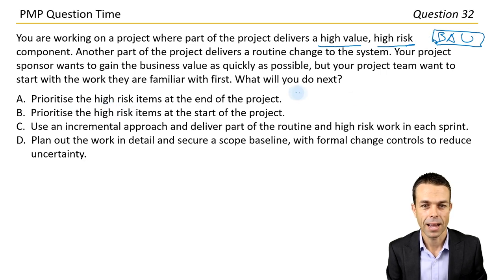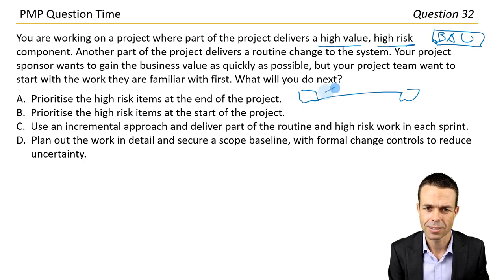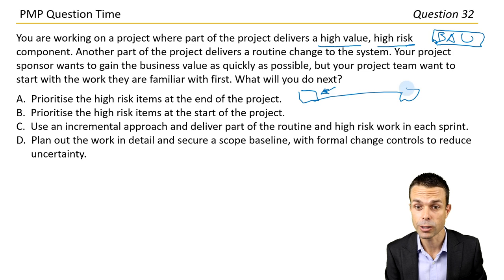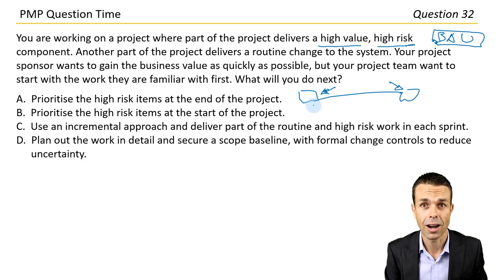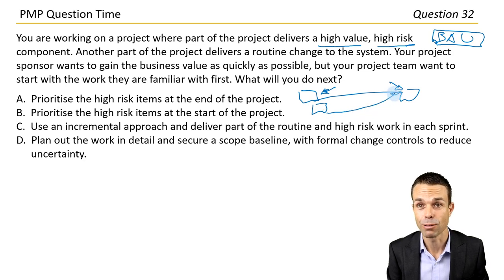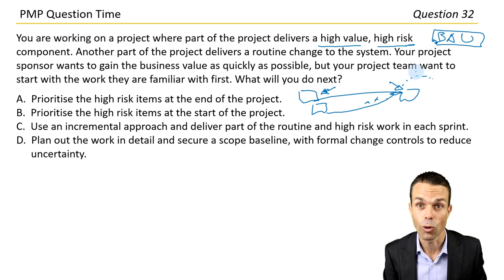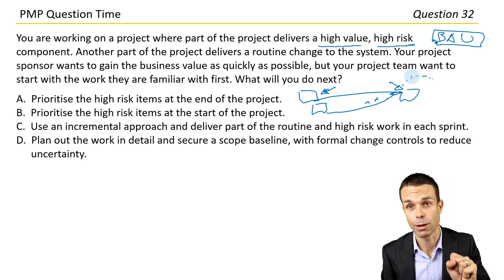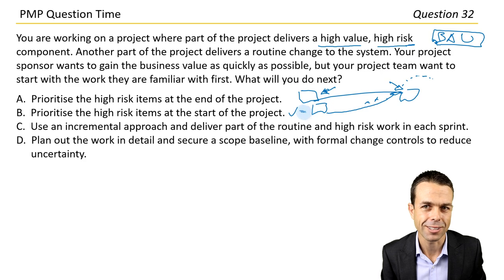Option A: Prioritize the high-risk items at the end of the project. Option B: Prioritize the high-risk items at the start of the project. That actually sounds pretty good — it's a principle we follow: try and remove all the high-risk items first. The risk gets higher towards the end of the project, so if we haven't delivered it, the risk becomes higher and higher — maybe we won't deliver it at all, or it will impact something else right at the end.